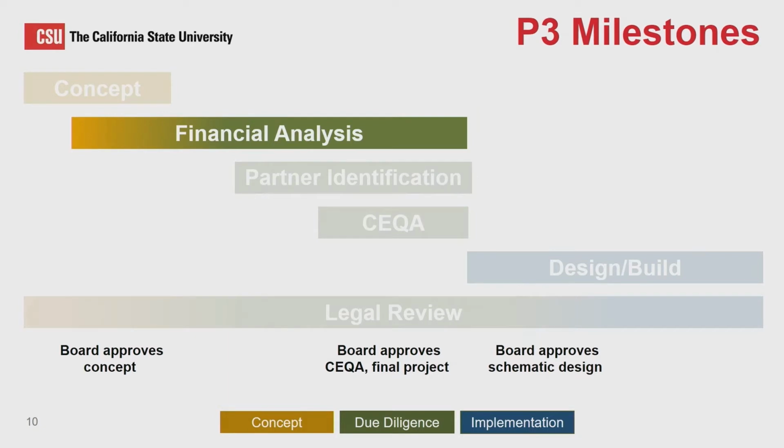Sure. So we'll work with the campus. We'll actually start very early in the process, doing some financial analysis, kind of understanding what we might want to get out of the project financially and so forth. But the real heart of what our financial analysis entails takes place once we've received proposals from prospective partners. That follows the RFP process. Because now, in this case, we have actual numbers and actual structures that we can analyze and kind of dig into the numbers, and also compare proposals, one prospective partner versus another.